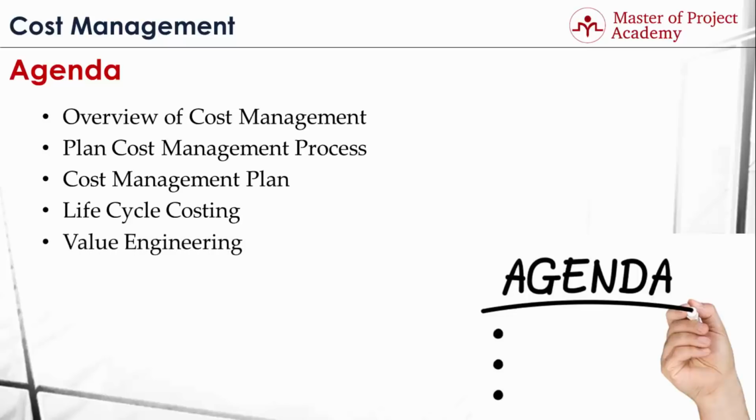Value engineering is performing the same work in a less costly way. For instance, if you need a bulldozer for your construction project only for 2 months, most probably leasing the bulldozer will be less costly than buying a bulldozer if you won't use it in your future project works. We will go over this concept in detail in our further lectures.